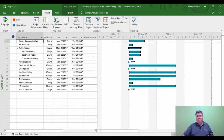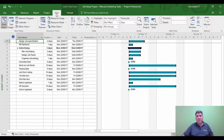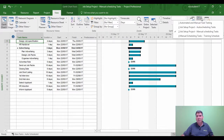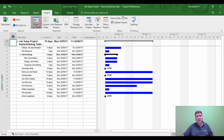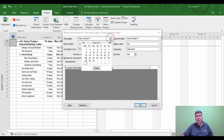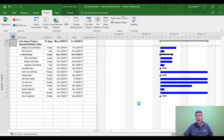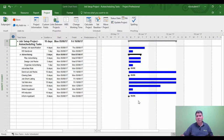Now using the same example for automated tasks — I'll go to View and check my windows to find the same project with auto-scheduled tasks. These are all starting on the 22nd. If I now change the start date to the 5th of June, they all change automatically. You can now see that auto-scheduling gives you the ability to use Microsoft Project's automated features.